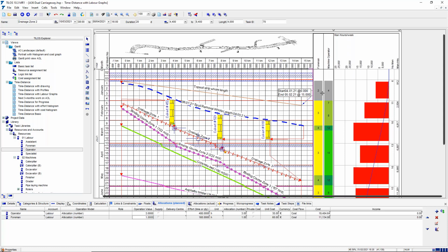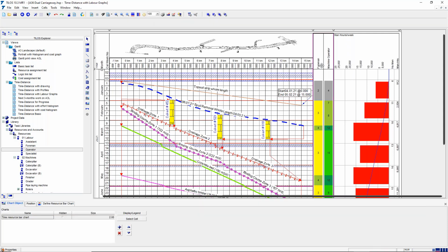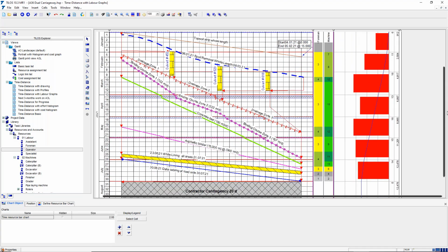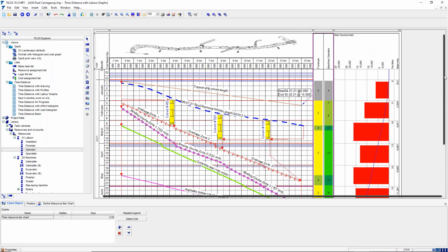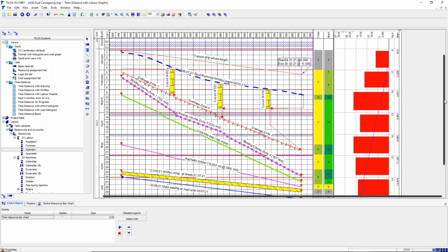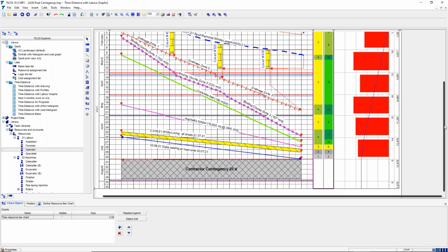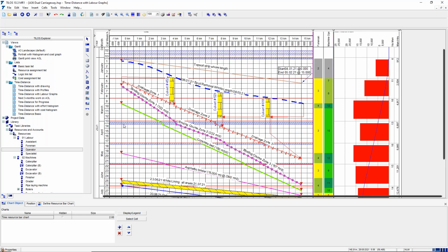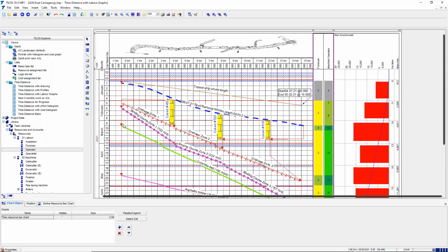So that's how resources can be viewed. You can have one per individual resource with a quantity, and you define a color set for that. And also I've got one here of all resources and the weekly man hours from everything happening in that week. So we've got that as red bars, and the blue line is the cumulative value shown in this table. So everything you see on screen is what you get when you print it out, and that could be financial values as well.